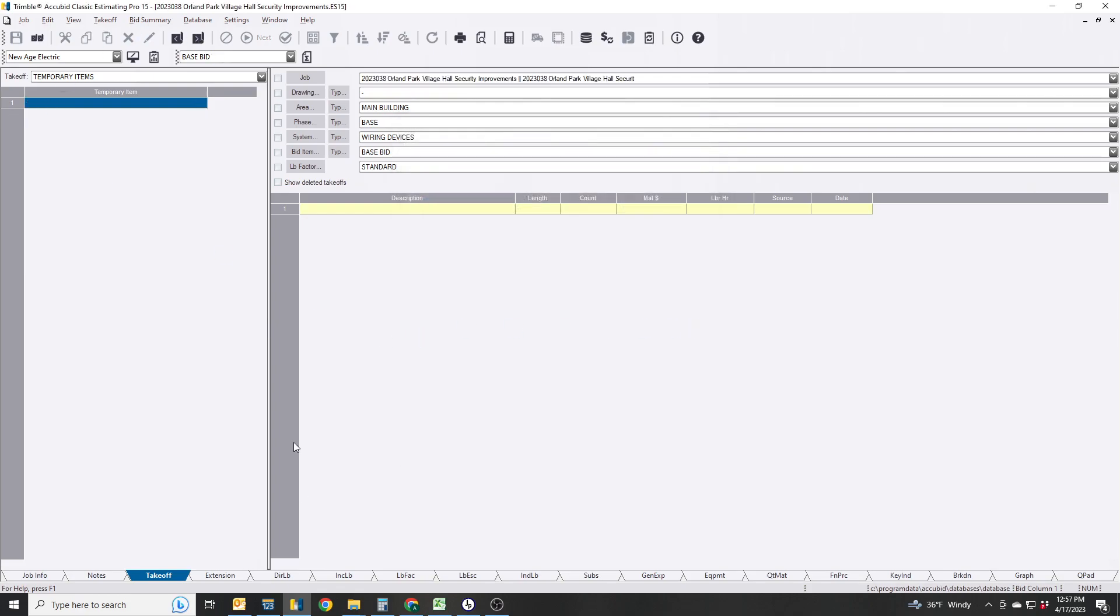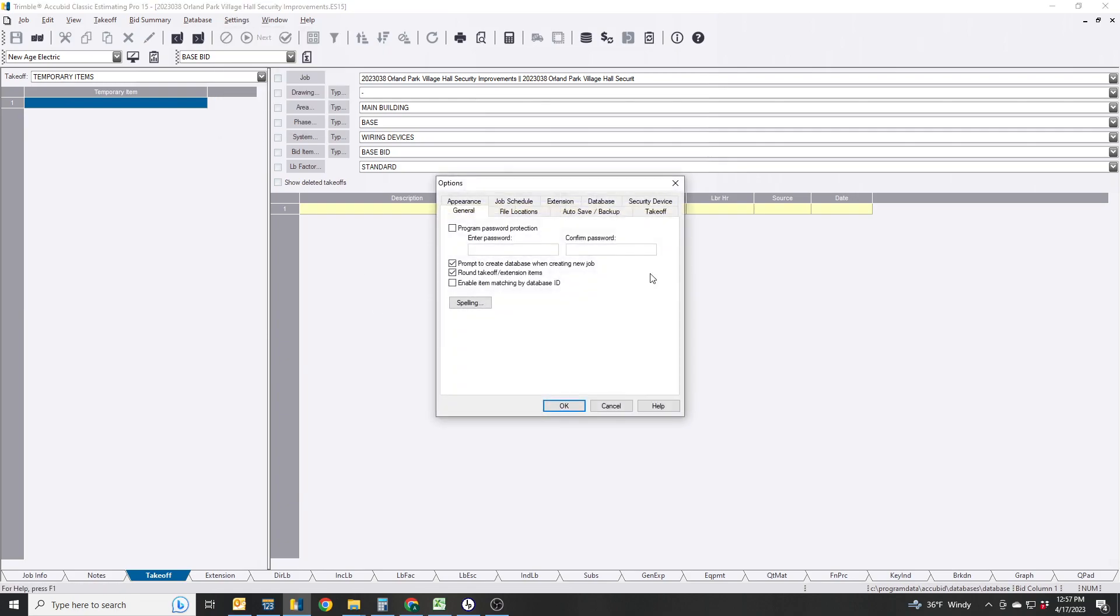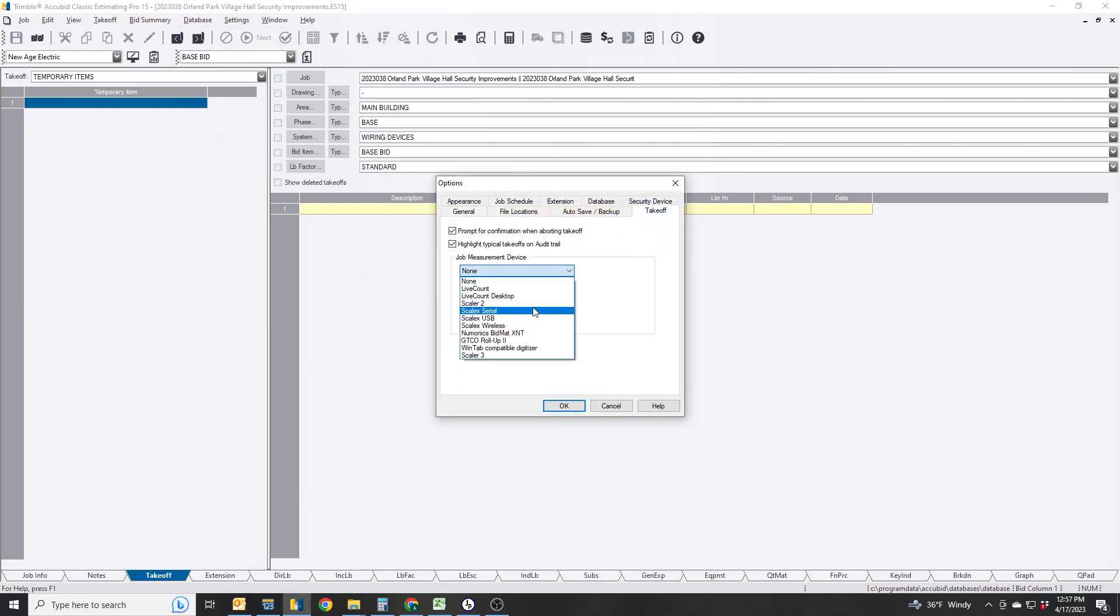Just like on our previous tutorial, make sure you go to Settings, Options, Takeoff, LiveCount Desktop, so it automatically links when we create this.